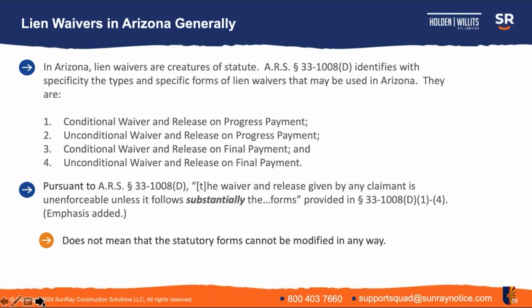As I said below here on the slide, this does not mean that statutory forms cannot be modified in any way. And there may be some circumstances that we'll get into in a little bit where you want to modify a statutory form in some respect. Signing a waiver, you want to be careful and make sure that you're signing something that is similar to the statutory forms. And if you're asking folks to sign a waiver, you want to make sure that it's substantially similar to the statutory forms to avoid the potential that it be unenforceable.